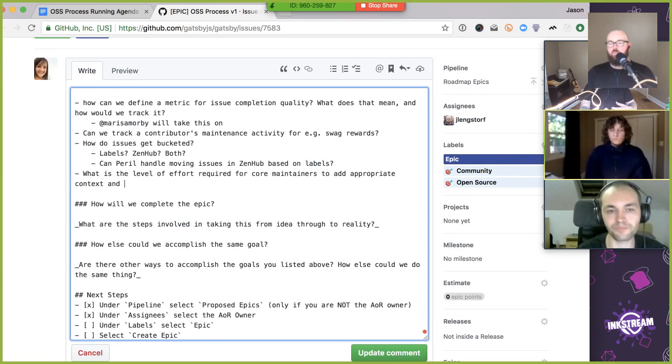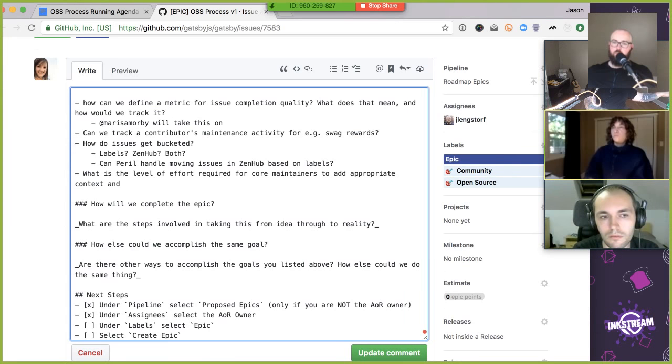So that review would be a great decision point for you as a core maintainer to say, okay, this is actually going to be like a half day's worth of work and it touches 2 files. So instead of doing that work, I'm going to write it up and put it back in the queue, and then I'll move on to the next issue. And that issue is going to have multiple touches, lots and lots of things that are going to be changed. So that one makes sense for me to do. And then you would claim it. And you see what I'm saying? Like maybe that's the way to...